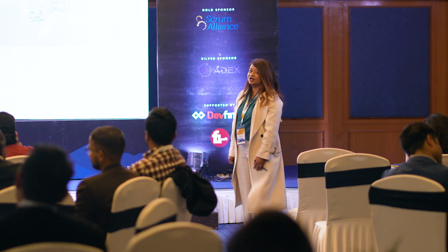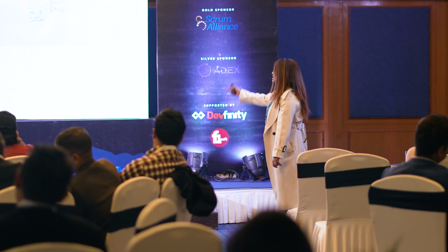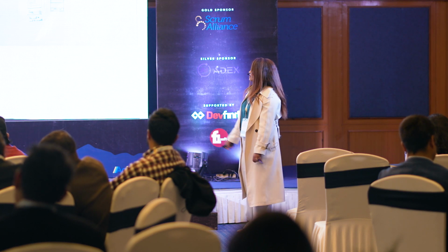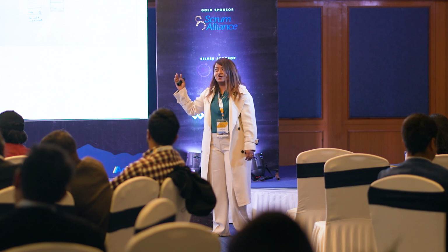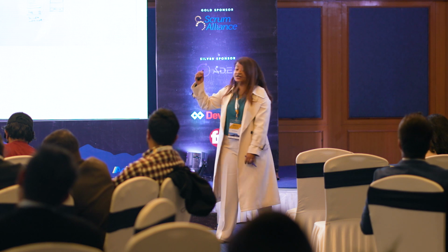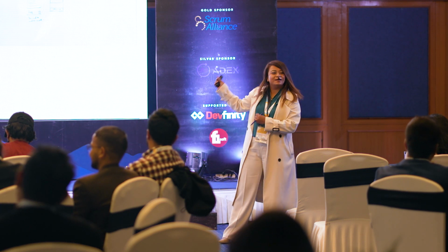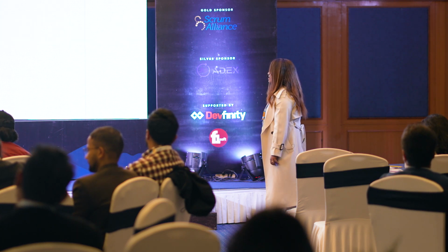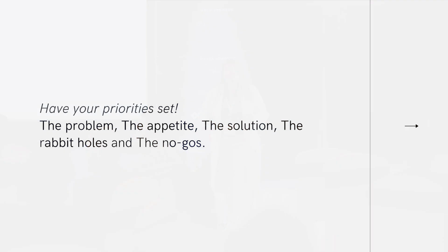So fat marker sketches is also basically that. As you can see in the diagram, you can see the word "bad" written over there, which is basically the no-go, the list of things that is required, the flow, and you can have a rough idea of what it's going to be. So yes, there's still detailing left to be done, but a rough idea is there. So shaping would basically mean you understand the product, you set your appetite, the solution to it, what are the risk factors involved, what are the technical depths involved, and then what are the no-goes, what are the limitations.